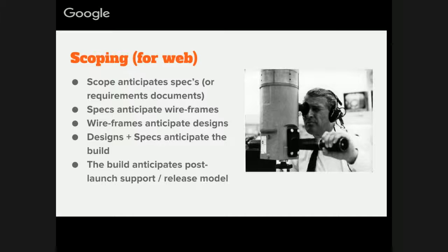And so what you're doing, aside from the idea that you may need to pull the plug and do a formal gap analysis, is consistently closing the gap, reducing the information uncertainty, increasing the resolution. And so specs anticipate wireframes, which anticipate graphic design concepts or HTML prototypes.